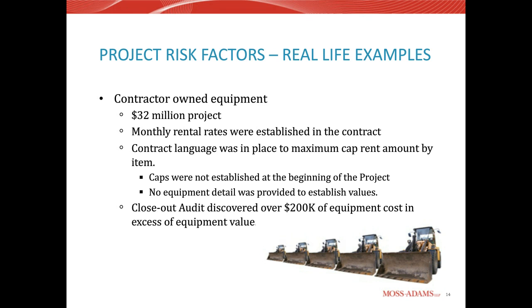Most likely in the standard contracts or the AIA type contracts, it establishes the maximum at the value of the piece of equipment when it comes onto the site, less salvage. So for a pickup truck, if a pickup truck brand new is $25,000 and it was brand new on the project, and after a 2-year project, there are a lot of different indexes out there to use, but let's say it's worth $10,000 after that, really the maximum value should be $15,000 of rent for that pickup truck.